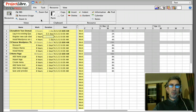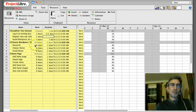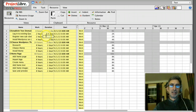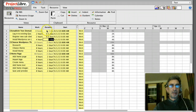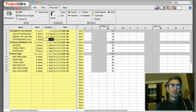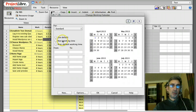That works out fairly well in theory, but it's not the reality for most people working on these tasks. What I suggest is to just stick with the eight-hour day and adjust the work duration knowing it's an eight-hour day, and let things extend out that way. Unfortunately there's no easy way in these programs to say how many hours per day you plan to spend per item — they assume teams and regular work schedules, so we make the best of it within those constraints.